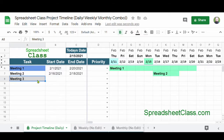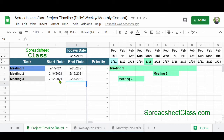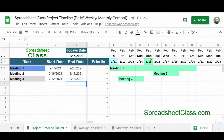For Meeting 3, I'm going to set a start date of 2-12 and an end date of 2-14. The timeline of the task is displayed from 2-12 to 2-14. But the cell background color here in cell A8 for Meeting 3 is gray, indicating that the event has already passed because today is 2-15 and the end date of this task is one day before that on 2-14.